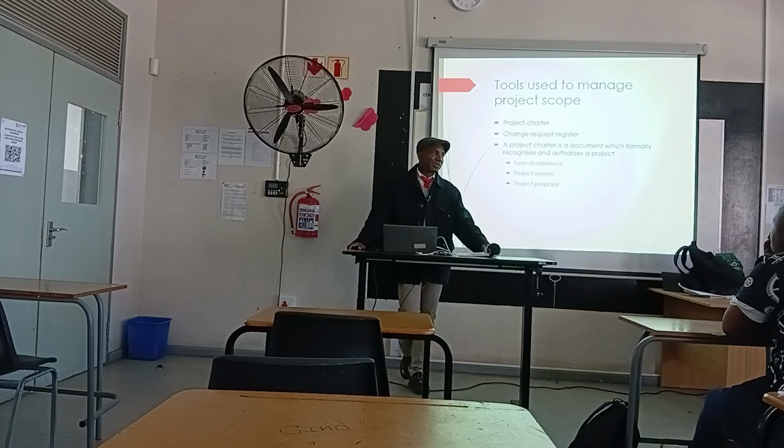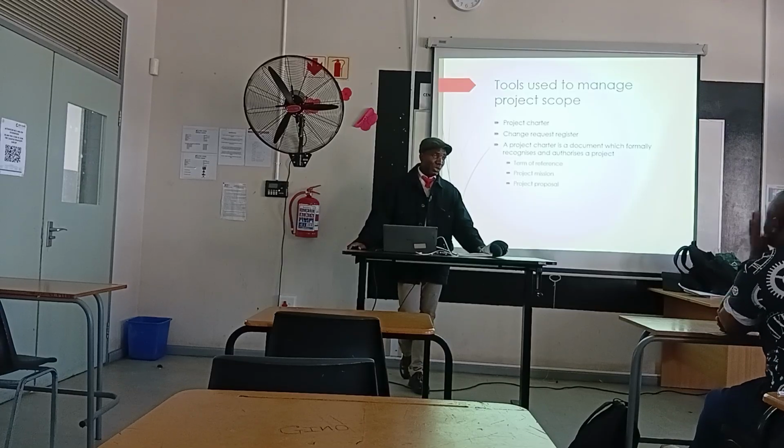So what are the things that you can write in the change request form? The form is designed in such a way as to collect information like who is making the request for a change, where you need to put your name and the type of project, then whatever change you are proposing, you need to put it there. If there is an alternative that needs to be looked at, it needs to be written in the change request form.